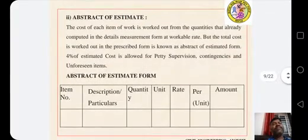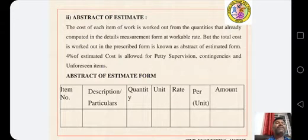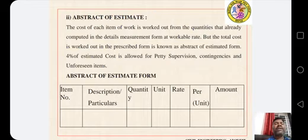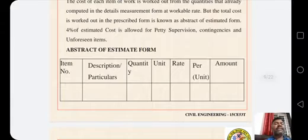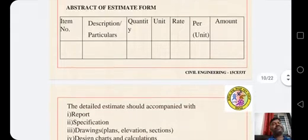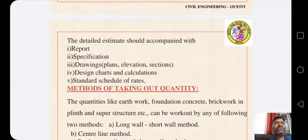The second type is the Abstract Estimate. The cost of each item of work is worked out from the quantities already computed in the detailed measurement form at workable rates, and the total cost is worked out in the prescribed form — this is known as the abstract estimate. In the abstract estimate, 4% of the estimated cost is allowed for supervision, contingency and unforeseen items. The abstract estimate tabular column includes: item or serial number, particulars, units, quantity, rate per unit, and amount. The detailed estimate should be accompanied with a report, specification, drawings, design charts and calculations, and also standard schedules of rates.